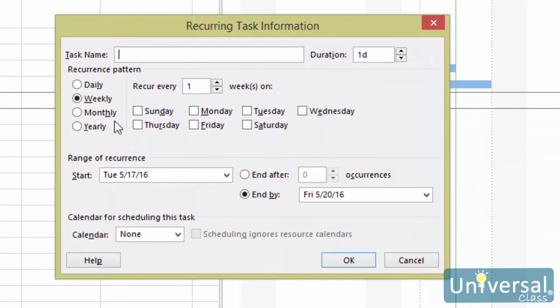You will then see the recurring task dialog box. Enter a name for the task, then set the duration for the task. Then set a recurrence pattern. You can choose daily, weekly, monthly, or yearly.